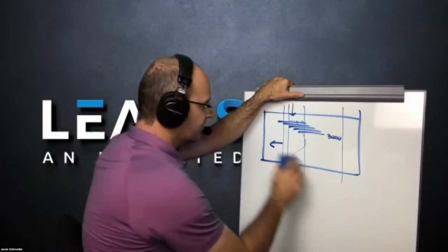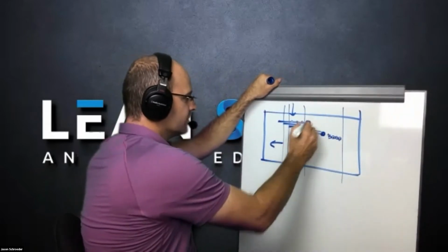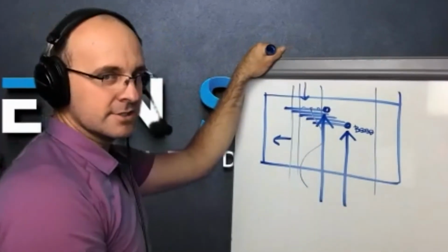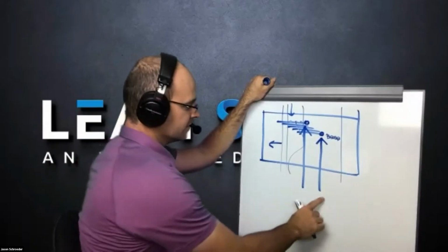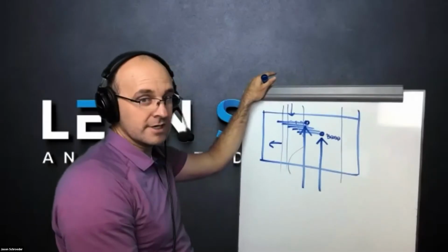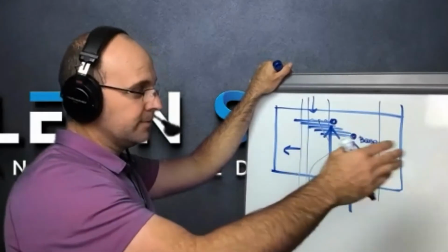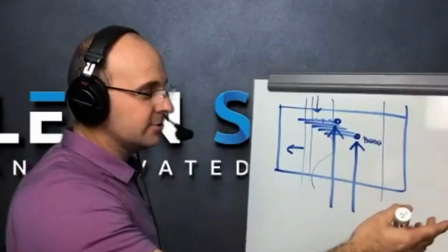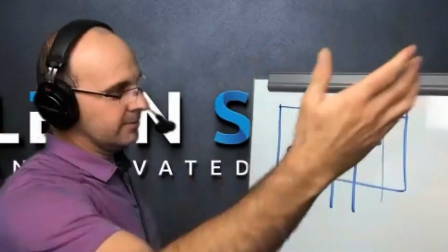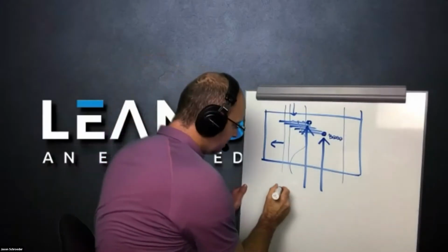Oh, here's another principle before I leave this one. When you say, hey, this is our deadline, this is our milestone, usually when milestones are clearly communicated to trade partners, that's when they're going to start to harp on why it's not ready. For instance, if I said to a group of trades, does anybody have any roadblocks? You'll hear crickets. Like, nobody's going to say anything. But if you say, hey, this group of people, these 3 or 4 trades have committed that in 2 weeks we're going to be done with such and such, then they're going to be like, oh, okay, well, hold on, I'm going to need this, you don't have this ready. Immediately they're going to start to tell you why it's a problem.